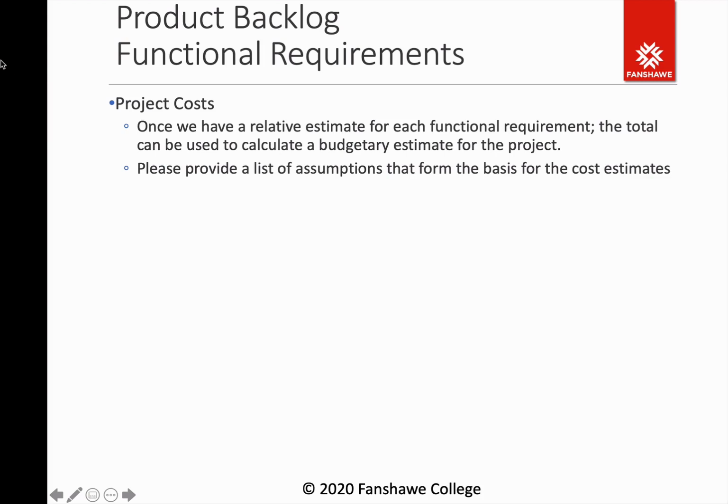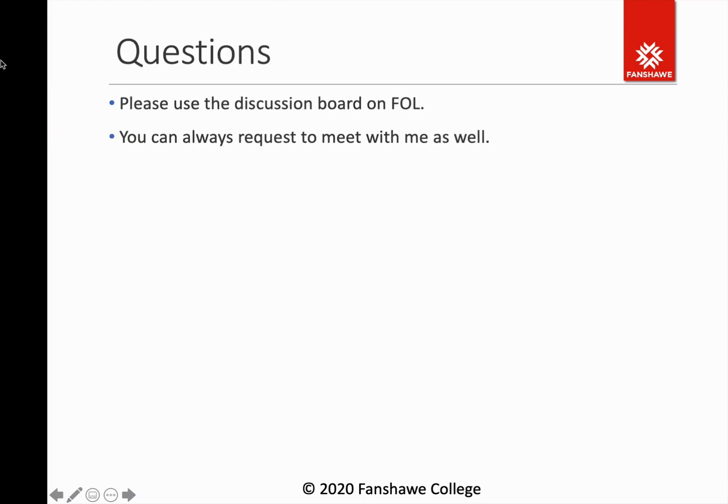And then the assumptions will list out things like, what's the hourly rate for the developers? Are there any equipment costs that went into our overall calculations? Are there external fees that need to be paid? Again, users want to know at the beginning of a project what a system is going to cost. And so in the template, we accommodate that. And that's it for at least covering the template itself.